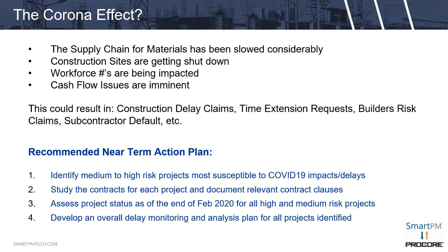I see a lot of projects these days where the schedule looks pretty, it's just disconnected and the critical path is off, and that is the last thing we need. Other things that I see as a big risk here is if you're putting in a lot of finish constraint milestones to be able to track different things, all that negative float is just going to be very, very confusing for you, as well as the people you're trying to explain delays to. So those are a lot of things that you can do there.